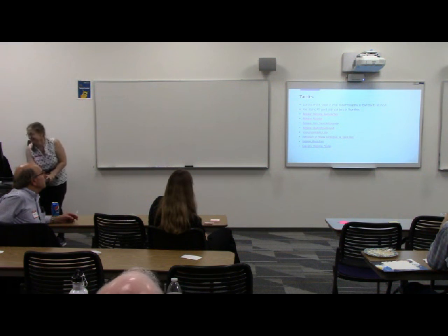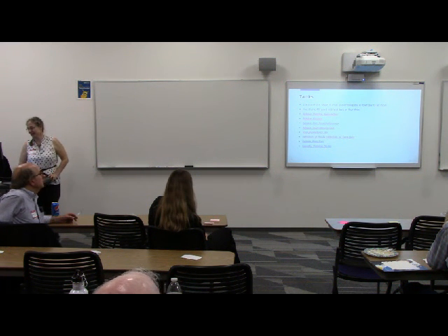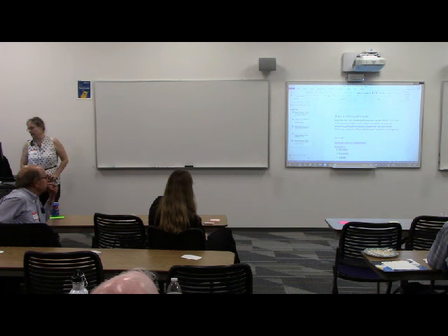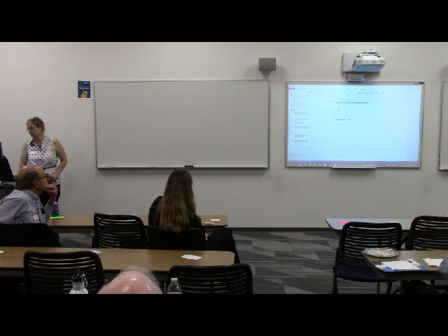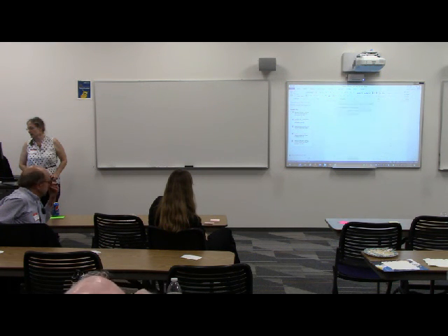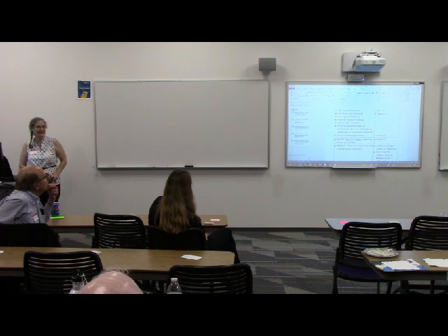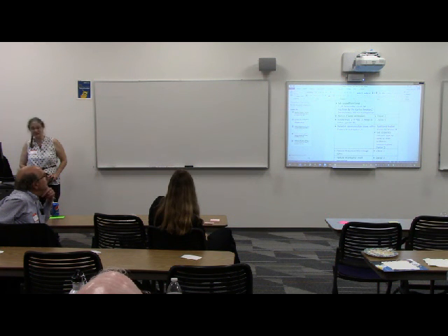All right, and then we had a spreadsheet, or rather a document, which has our risks. You can see that there are no more up here in the identified risks and impediments. Instead, we have some things that have been resolved, some risks that have been accepted, and some risks that are owned. Gordon back there in the corner is one of these owners, and I'm another one, and there are a few other owners here and there. So we have to make sure that these things get taken care of.